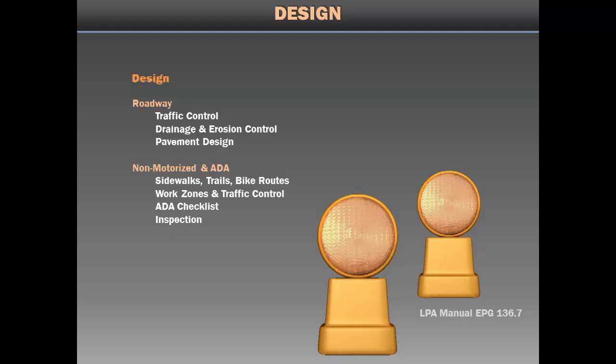Pavements are one of the most expensive parts of your project. MoDOT has been successful in the use of alternate and optional pavement designs to get the concrete and asphalt industry to compete on paving projects. This has resulted in more bidders and lower costs due to both industries sharpening their pencils while competing head-to-head. If you are interested in using life cycle costs for alternate pavements on your project, please contact MoDOT for assistance.